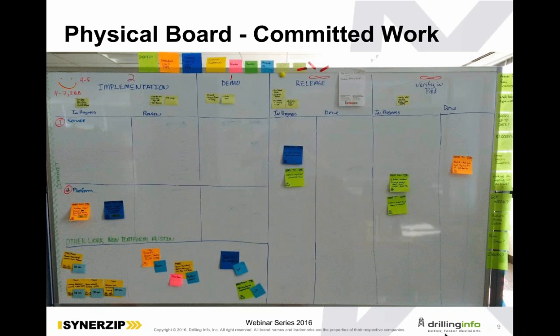that was to handle any requests coming from any stakeholders or customers that were requesting work from our team. And so we had a specific lead time for that, and we could actually go back and look at that lead time and create SLAs and give them some idea of when it was coming out, so they know how to schedule their work and sequence their work. And then the platform swim lane was for our team, because we were creating a lot of demand, because we were building a lot of infrastructure stuff for our microservices and whatnot to serve up data. And so we have that one there.